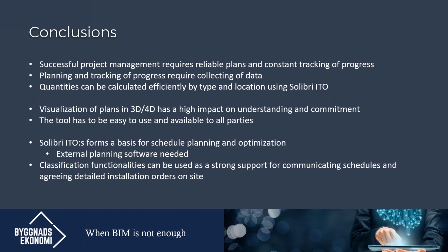However, this is not a scheduling tool, so you would need an external planning software for the scheduling part. Classification functionalities can be used as a strong support for communication and for communicating the schedules and for agreeing the detailed installation orders on site.